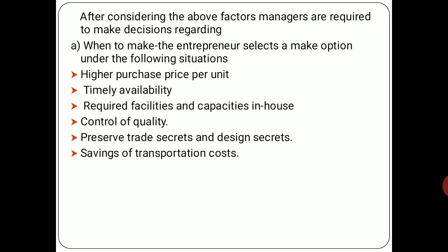Next, time availability. When you have enough time with you, why get things from outside? Let us produce by our own. Required facilities and capacities in-house. Every equipment, every machinery, everything which you need to produce something is available in-house. Why get it from outside?